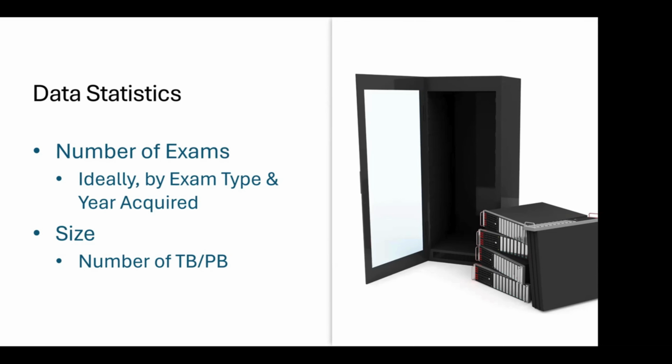Also, if you're dealing with legacy systems that have proprietary data, like the Hologic breast imaging SCO format, and you're going to be converting those to the DICOM standard BTO format, in my experience, the BTO format is like 2.5 times larger once the exam is converted. So you can't make the assumption that the data required to store the legacy data will be the same that's required to store it in the future system. So it's important to consider all of those systems, all of those variables as you're looking at the data.